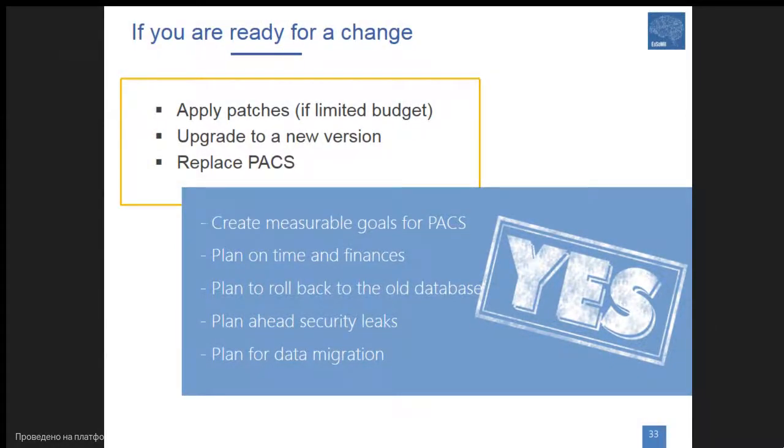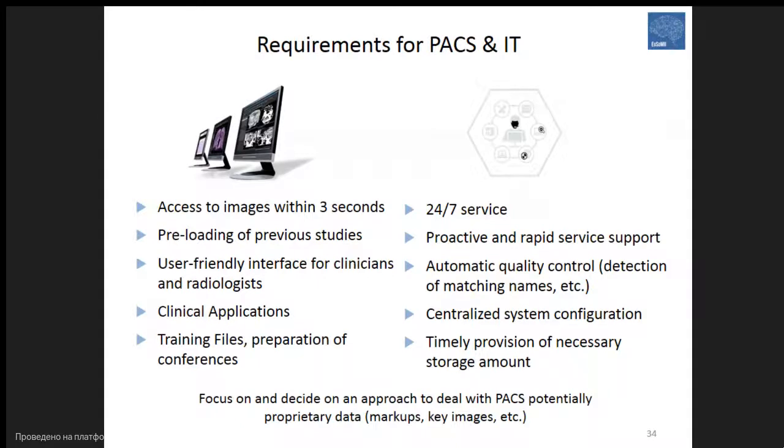If you decide to go for changes, you can apply patches with a limited budget, upgrade to a new version, or completely replace the PACS. You need to define measurable goals for the PACS, plan time and finances, plan a rollback to the old database if something goes wrong, plan ahead for security leaks, and plan for data migration. These are important steps for moving from the old PACS to the new one.